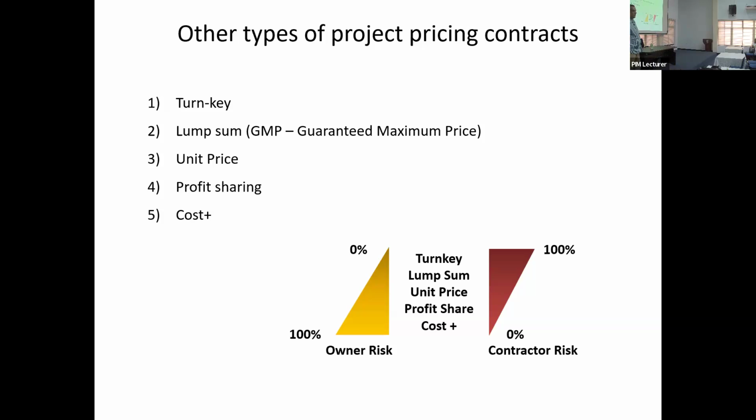But look at the owner's risk. It's very high. Because if this fellow will go and buy the best and put it, then the owner keeps paying 10% more on each one. So when you're doing this pricing, it's important which one you want to do, what fits the project. Who is willing to take the risk?